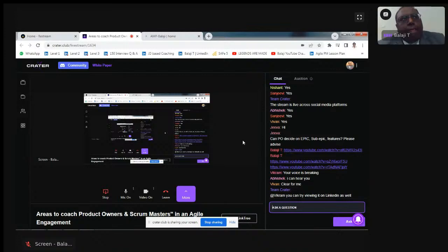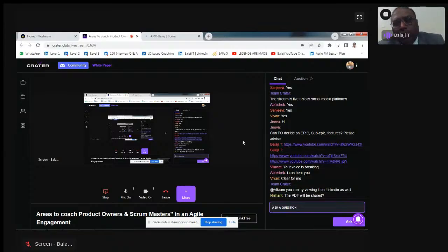Possibly these are all the areas. One more thing is, an agile coach can speak to the product owner and ask powerful questions like, on top of the team level ceremonies, do we need any program level cadences, or any portfolio level ceremonies? Because unless your epic is ready, and unless your feature is ready, your user story will not come and sit in your product backlog, right? So many teams are struggling at a team level cadence for one reason: they have not done the homework properly at program level and portfolio level ceremonies.